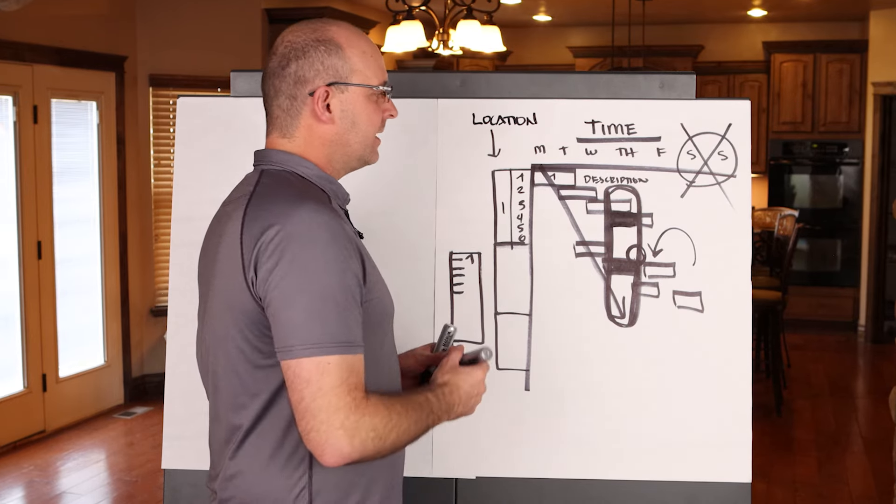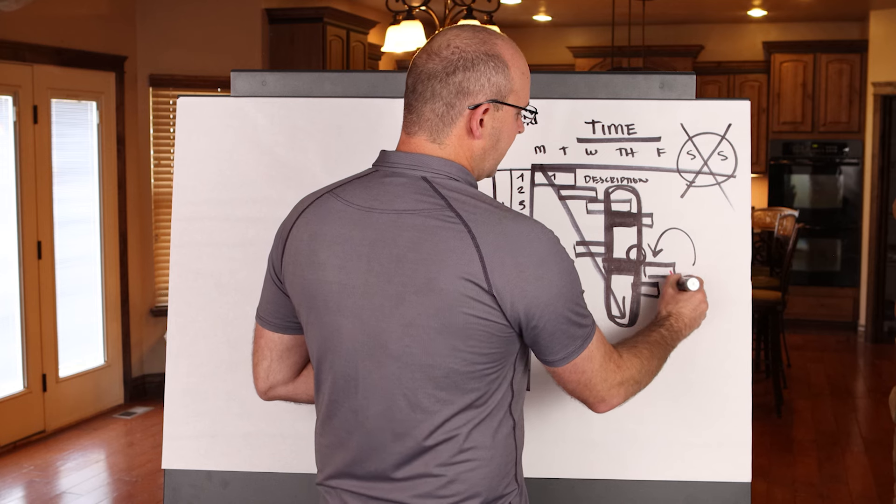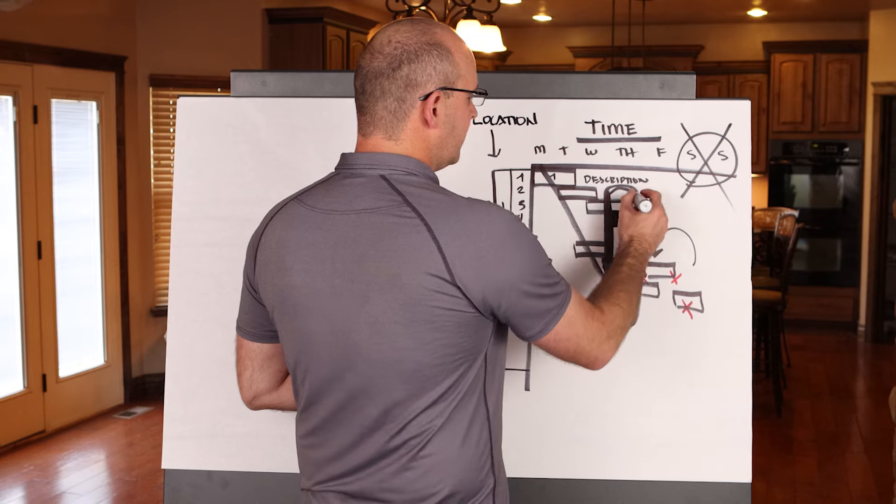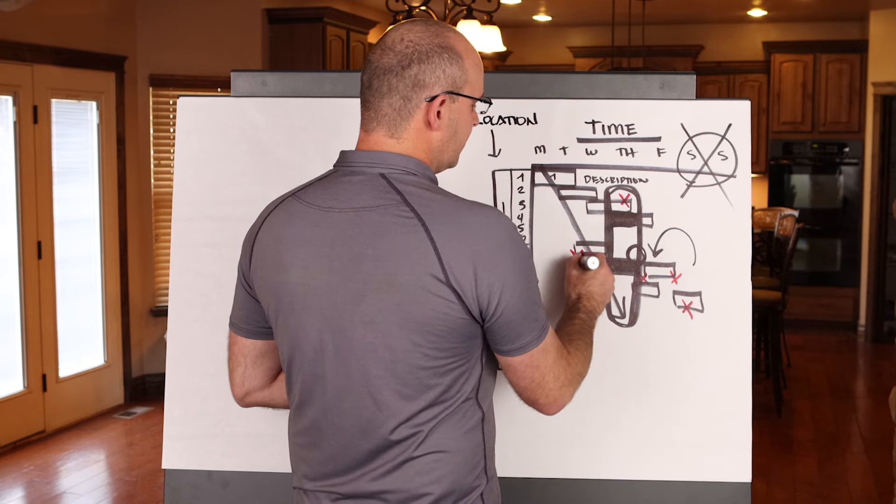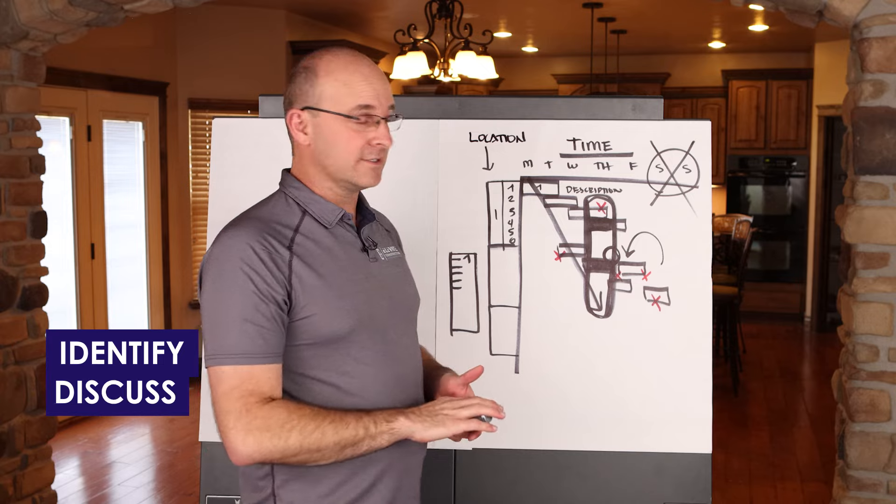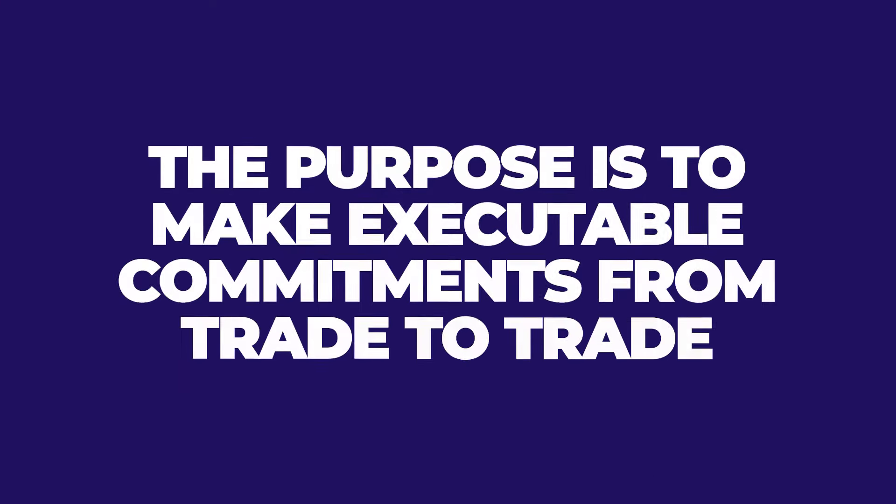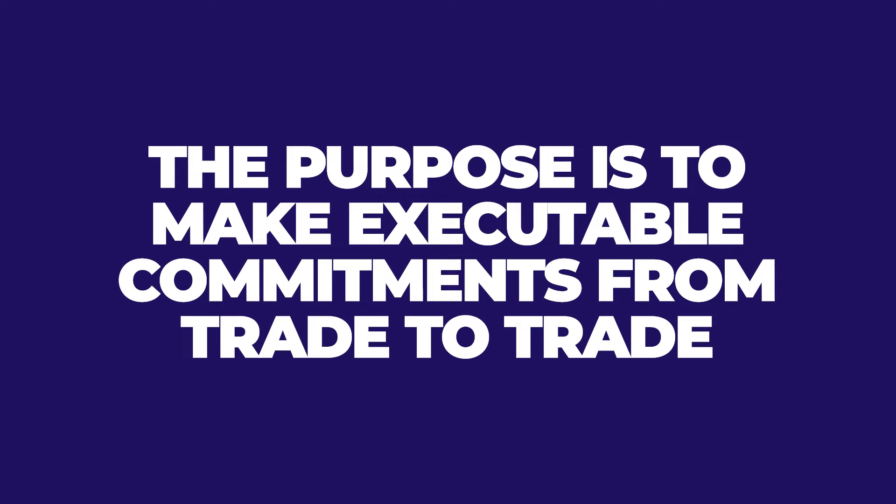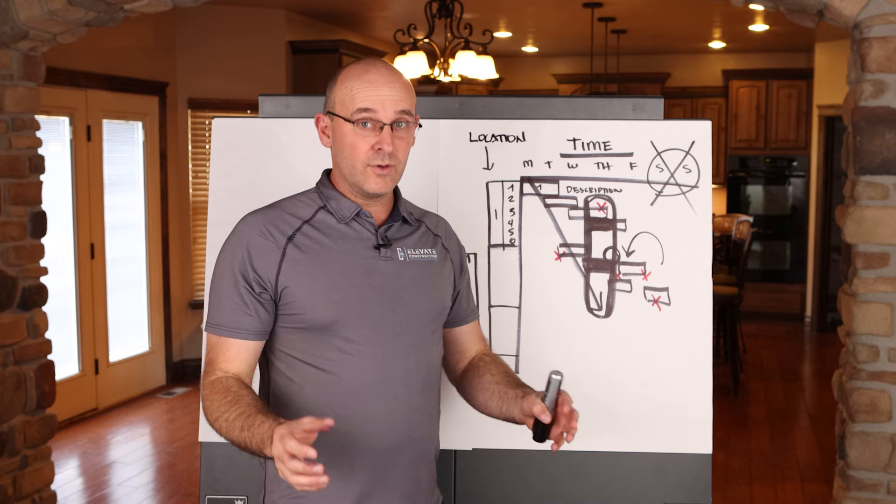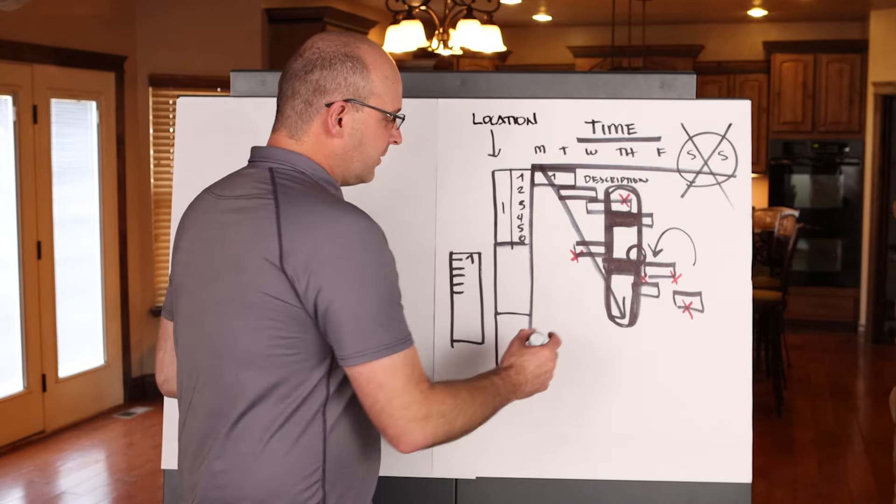Now, just like with the look ahead plans, we are looking for different problems. If we have handoff problems or a possible delay or an activity that's not made ready, we really want to use this weekly work plan to vet out their problems so that we can identify, discuss and solve and enable flow throughout the weekly work plan. The purpose is to make executable commitments from trade to trade and to get the format to see and know and act together according to those commitments.